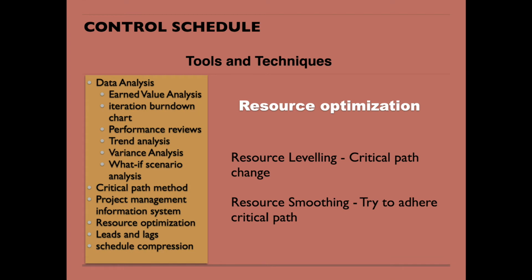As a project manager, you should be able to utilize your resources in an efficient way. So based on the project scenario, we can do resource leveling, we can do resource smoothing. Sometimes we need to put some extra hours for the critical activities so that we can adhere to our critical path. Sometimes we do resource leveling. So as a project manager, you should know where to do resource leveling and when to do resource smoothing.